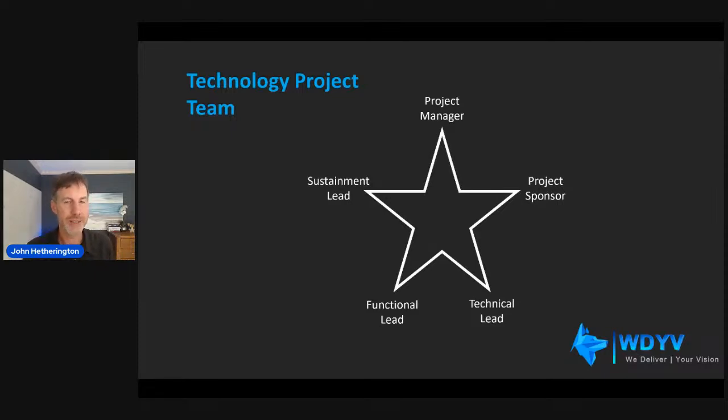So you're probably asking, why is this sustainment lead on the project? Why wouldn't we just involve them at the end? There's a huge benefit to having the sustainment lead throughout the project, because they get knowledge of what's being built. They see the workings and the testing, the communication we do on a project. They get inside knowledge on what we're delivering. So by the time we come to product launch, there are no surprises. Their team is already ready to pick up the project and deal with any questions. They've been involved throughout. Ideally, get them involved in testing so they get hands-on keyboards working in the new technology. And so by the time we actually come to go live, they can pick it up really quickly.